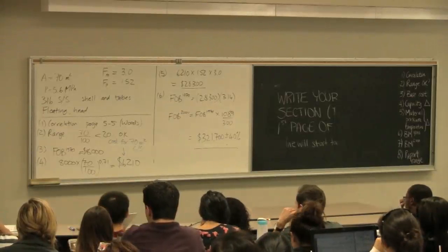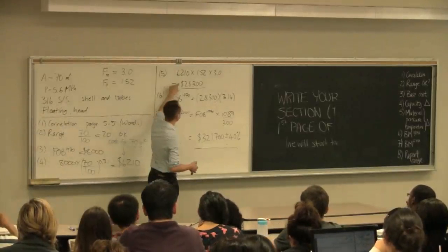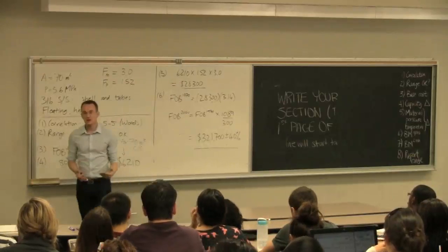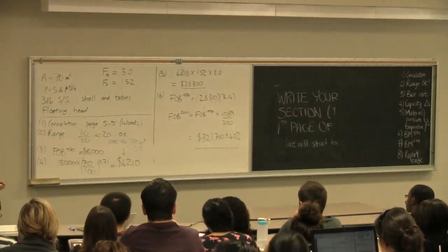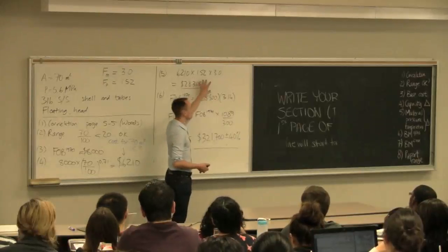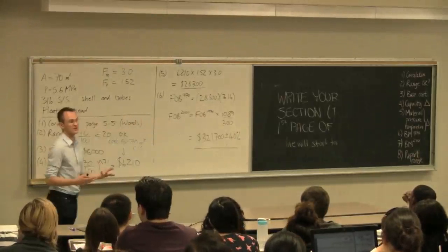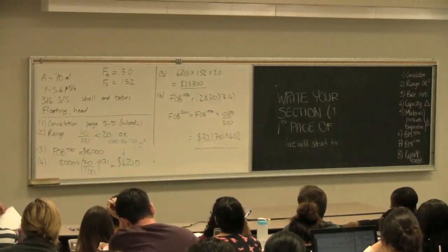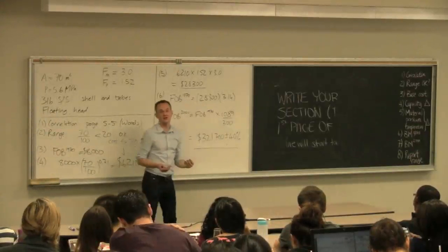Right. So the key issue is the bare module factor, 3.14, that you've been multiplying this cost by. This cost has been inflated already for materials and for pressure. But really, installing a unit, whether it's made from carbon steel or 316, inspecting it, painting it, insulating it, preparing the foundations, is not a factor of the material of construction. So it's artificial, or premature, to inflate this value by 3.14. You're overestimating the cost of the full installation price fairly substantially, because you're first escalating for materials and pressure, and then adding the bare module factor onto that. You're going to get a tremendous overestimate.